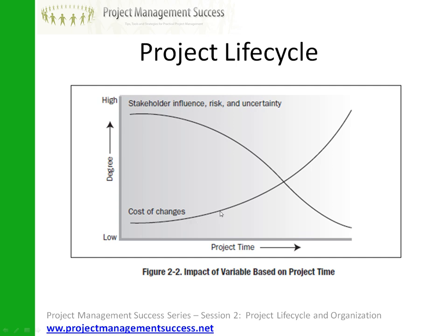But as the project deliverables are being constructed or developed, the costs of changing things go up. Toward the end of the project, if you've spent all your money building it and then you want to change it, costs become expensive. So this shows how the cost of changes varies throughout the project lifecycle.